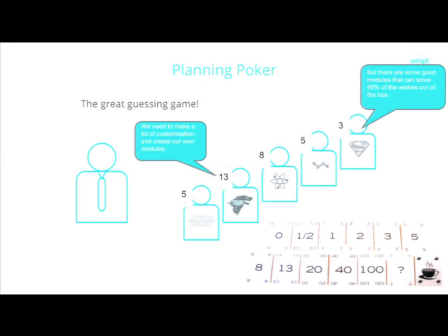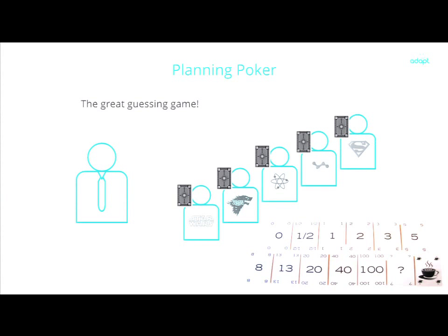Okay, wonderful. Then everyone picks up a new card, does the same as we did just moments ago, and we should be at least nearly on the same page. Of course, there can be a situation where we're not, but here we can say, okay, that's an 8. And always be a bit more pessimistic if you're in doubt. If you still have a big span in numbers here, there might be a good reason for that.